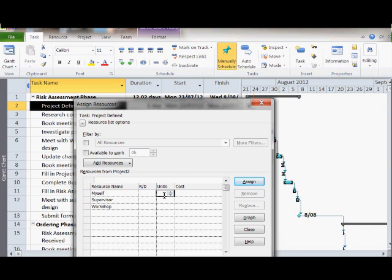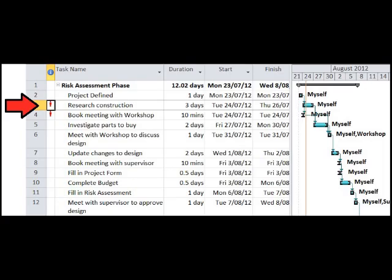If the resource cost is $30 an hour, and the duration is one day, and one day equals eight hours, the cost is $240. I have gone through and entered in the resources for all the tasks.